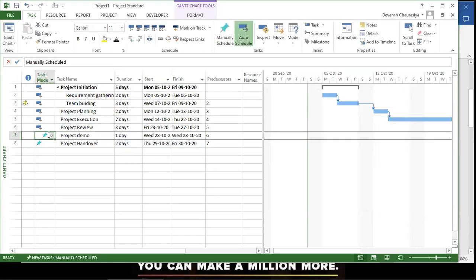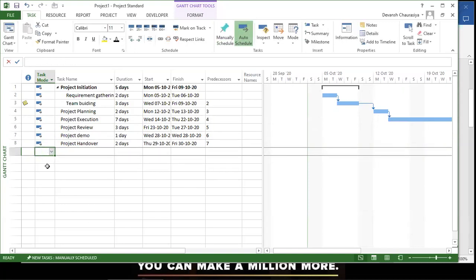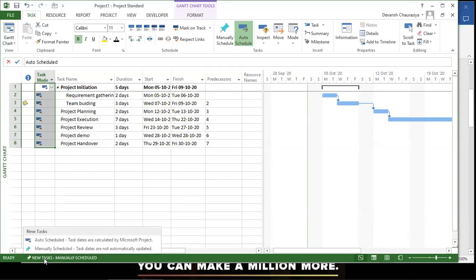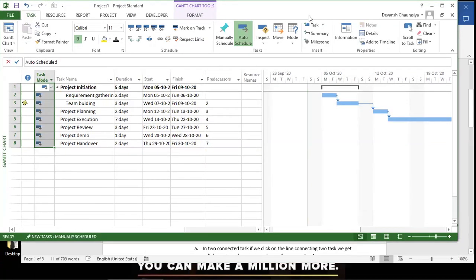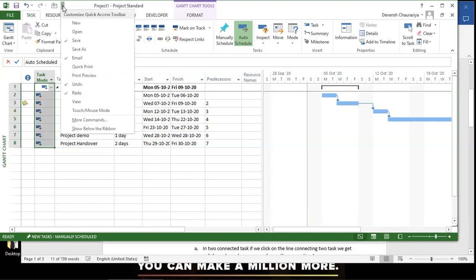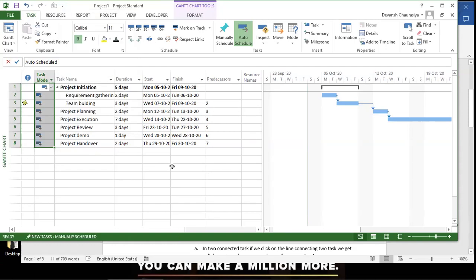Marking everything as auto-schedule: at the bottom taskbar you can see whether new tasks default to manually or auto-scheduled. There are also three view shortcuts at the bottom — Gantt chart, Task Usage, and Resource Sheet. You can also access these views from the left panel: Resource Usage and Task Usage.